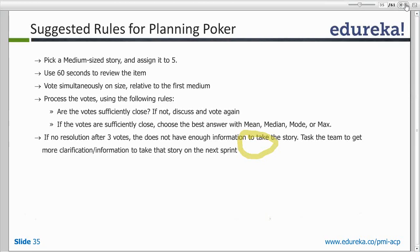If Devajyoti said 3 and Mathar said 8, they would discuss and ask questions to the product owner. The product owner would resolve their queries. Then, after all queries are resolved, there is a second round of voting. After 60 seconds, the Scrum master again says 'show' and they show a card again — it could now be 5, 5, 3, and the estimate becomes 5.